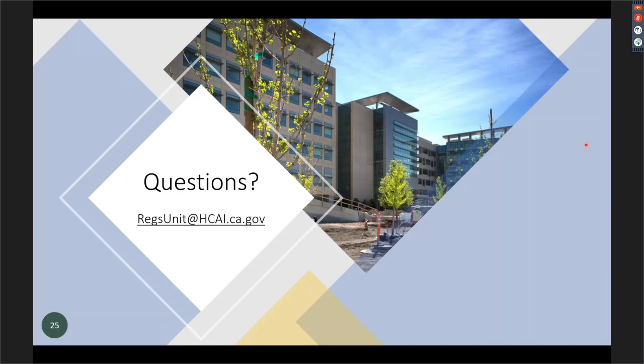So if you're getting 10 details on a single sheet, it depends what the change is. If it's the same change to all the details, it's one NMA, one change. Even if you're affecting 10 details or maybe more, across several sheets, it's still one NMA. But if you're doing a different change to each detail, that's a separate item.